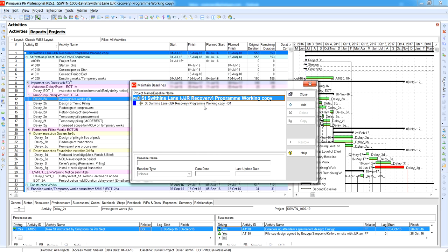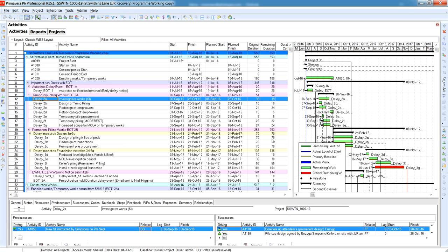The only way you would actually take out a baseline for revision is if it's approved. So never ever touch the baseline or change the baseline if it's not at the client's request or the client doesn't know about it. Okay, the baseline is a picture snap of what's been approved, and anything that's been approved, you do not touch it except the client requests it, or there's a variation, and that needs to go through a whole load of change controls, signatures, etc. required.